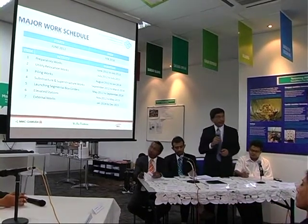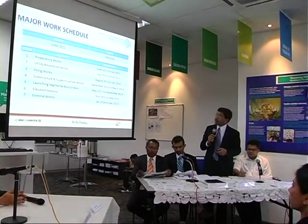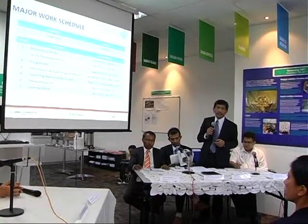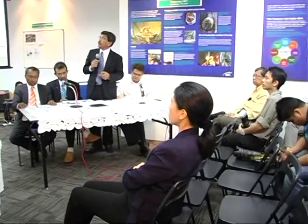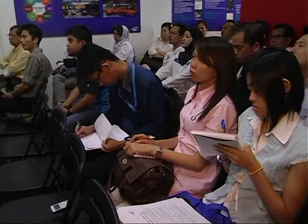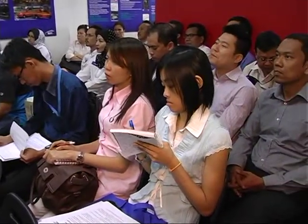I have extracted here from our master implementation program some of the major work schedule for your information. Basically, our project will start in June 2012 and will end sometime in February 2016. So the major works that need to be carried out are the preparatory works, utility relocation works, piling works, substructure and superstructure works, launching concept metal box girders, elevated station and external work.